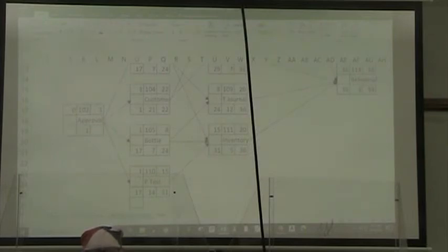Okay, so now we have a variety of choices here for late start times, and we're going to bring the smallest one back to our approval process. So equals MIN for minimum of the late start for production, comma, late start for designing the bottle, comma, late start for identifying customers, comma, and late start for designing the packaging.